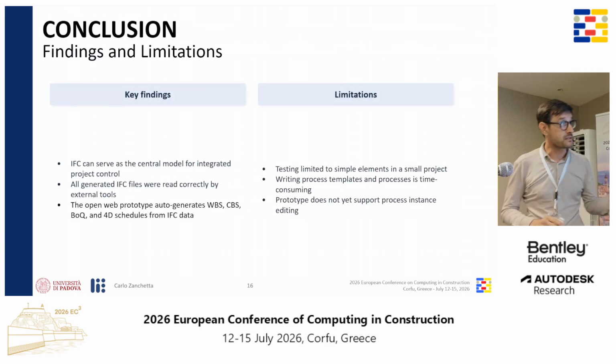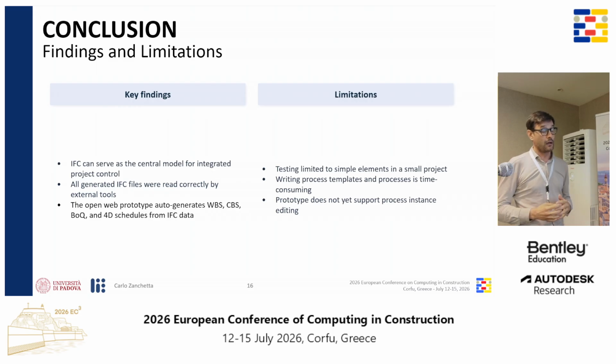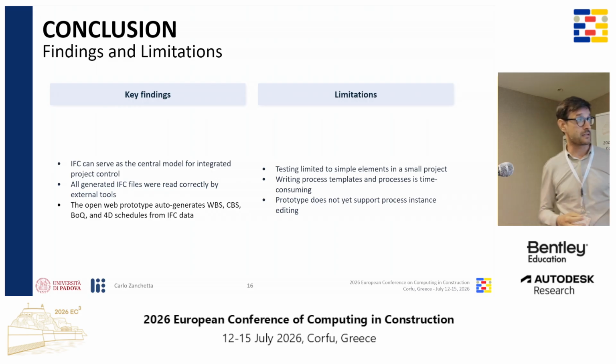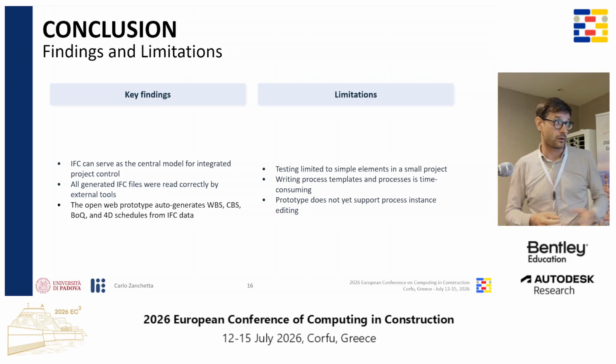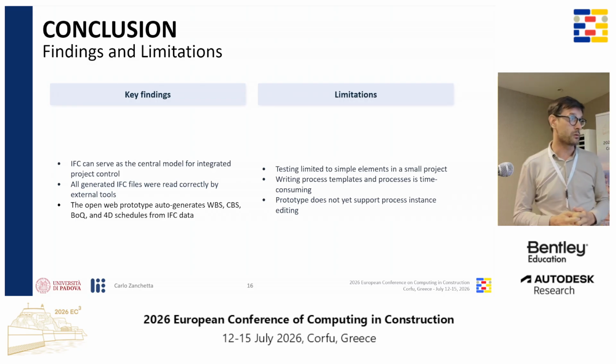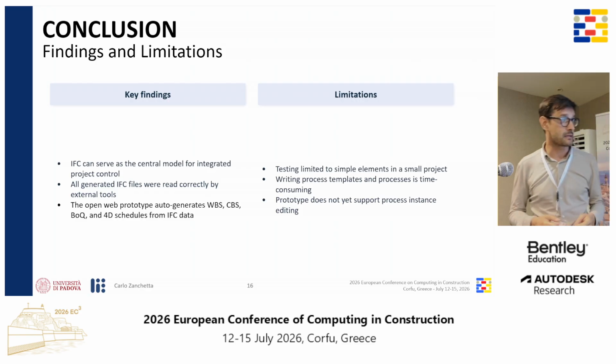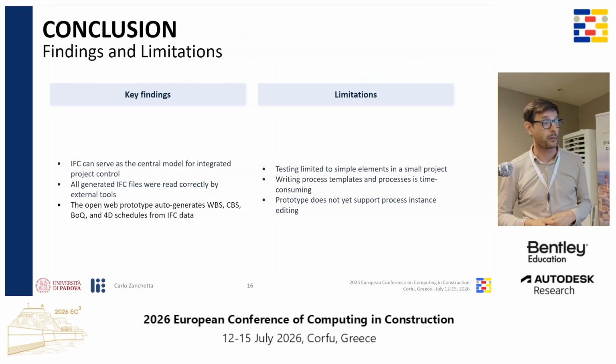So the conclusions are that first of all, IFC can serve as a central model for integrated project control, and all generated IFC files were read correctly by external tools. And then the open web prototype auto-generates WBS, CBS, BOQ, and 4D schedules from IFC data.